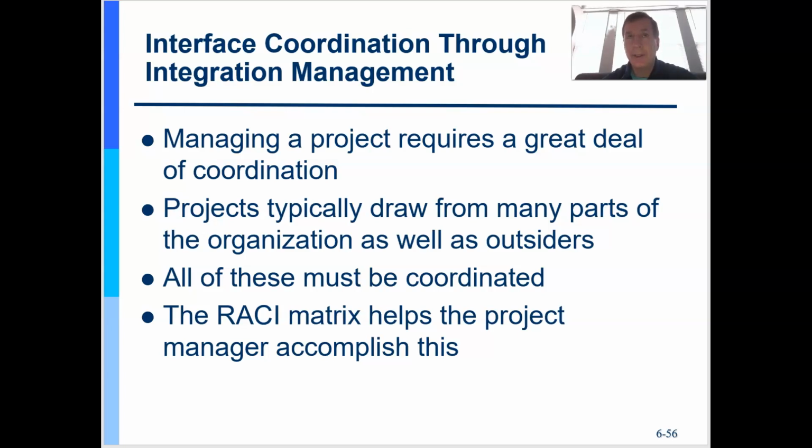Another is develop project management plan. Another is direct and manage project work, deliver and execute the deliverable, right? You're building it from what you planned. And also collecting knowledge, right? It's called knowledge management. Another one is monitor and control. And another process is called integrated change control. And then your final process is closing the project or phase.